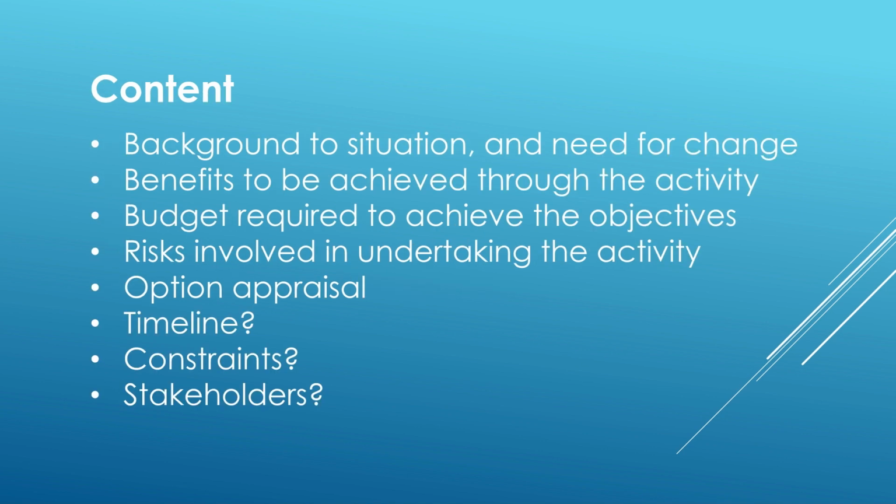So the typical content that you might find in a business case within a project management context is a description of the background of the situation. So what is the current situation and why do you need to change, or why do you wish to change? What are the benefits that are going to be achieved by undertaking this change, this activity? What kind of financial support is going to be needed to achieve those objectives? So there's going to be some estimating and assumptions about costs that need to be spent.